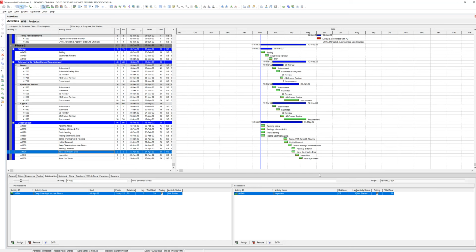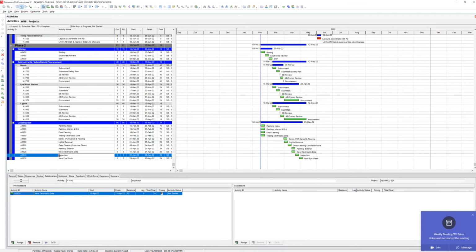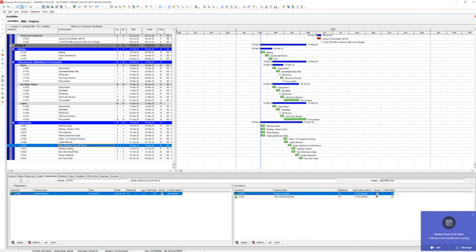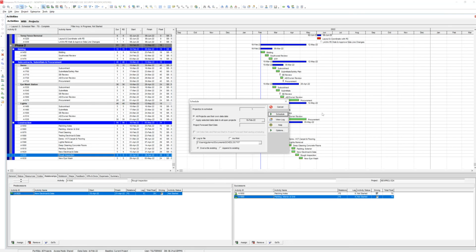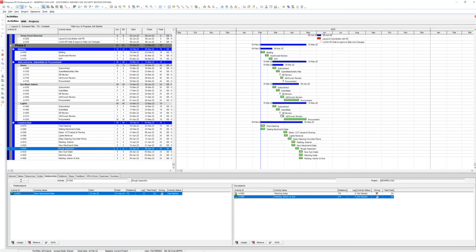Okay. So what triggers patching holes and painting interior and grid? Okay. So is this probably rough inspection? Correct, right? Okay, so let's rename it. I'm gonna call it rough inspection. Okay, so then rough inspection triggers patching holes and painting an interior grid. Cool. All right, so now we're kind of okay. Then the end of those two things trigger final cleaning.